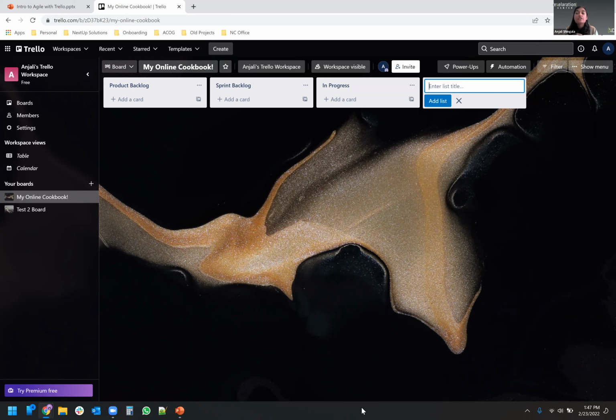And then from here, there's a variety of columns that people will add. I've seen people do QA columns if they have a QA department. I don't have enough time to get into it, but Scrum's not a huge fan of having a QA or a testing column. The reason is that, as part of being done, every story should be going through that to get across the board, and the developers should own that piece. As opposed to having a QA or a testing department, there are a lot of benefits to the developers themselves taking ownership when it comes to testing. So I'm going to go ahead and leave that out for right now.